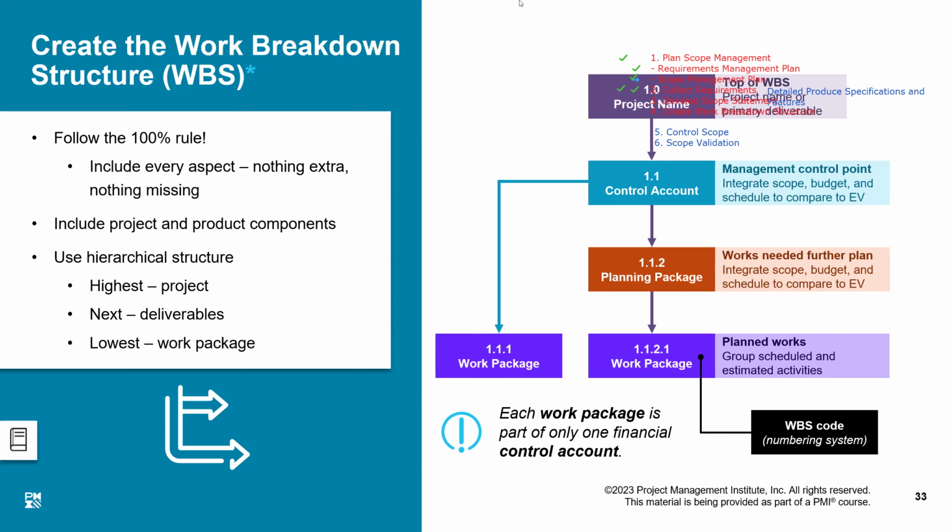The only truth is whether this job has been done or it is not done. That's it. That is the 100% rule. By default, it doesn't stop you from changing the rule, but the default rule, which is built into the system, is the 100% rule, which is quite basic and quite accurate. Whether it is done or it is not done, the day you complete it, I'll pay you the money for that. You understand that?